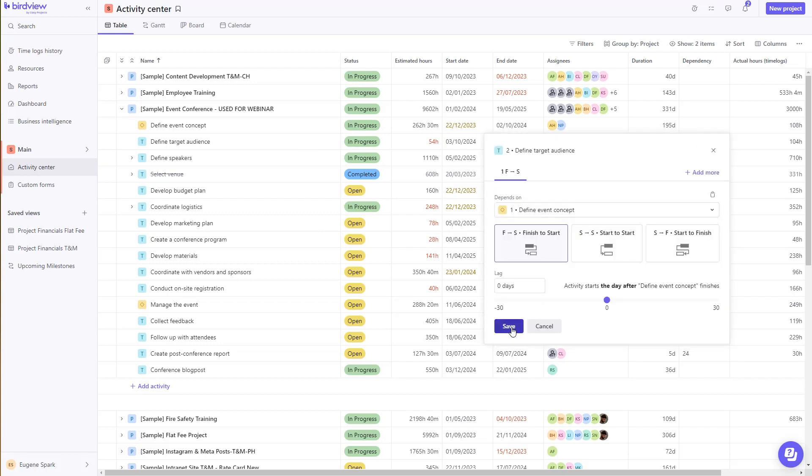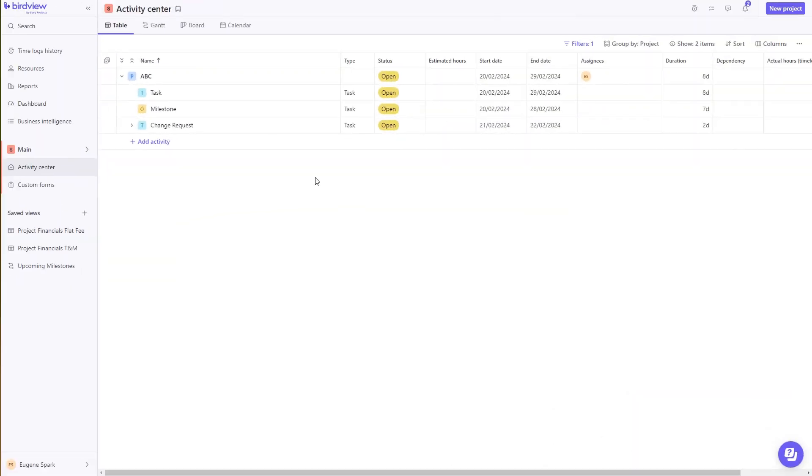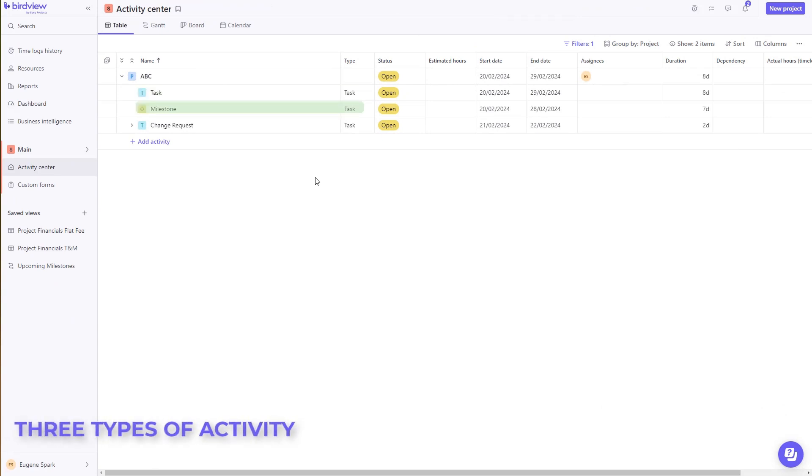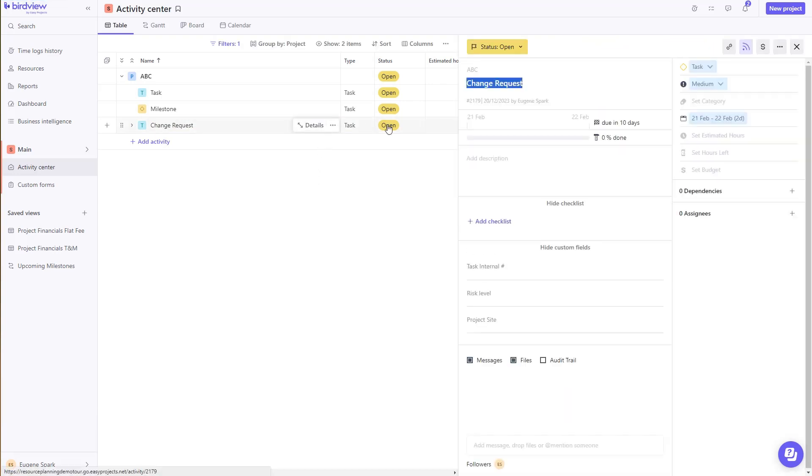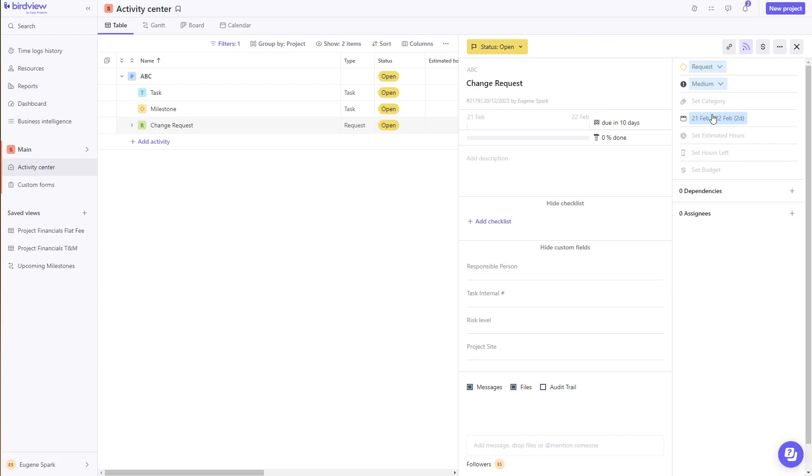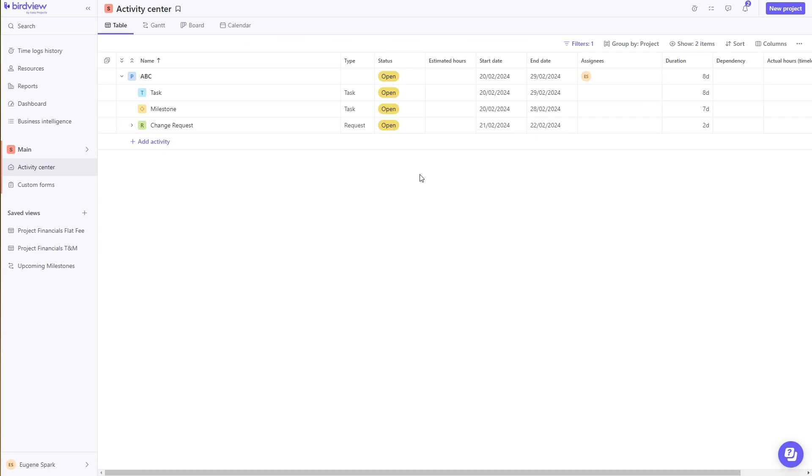Need to track an activity that is neither an action or a milestone, but perhaps a change request due to a deviation of scope? We have you covered. Simply change the activity type from a task to a request, and start tracking change requests, see those changes in real time, and how they impact your scope, time, and cost.